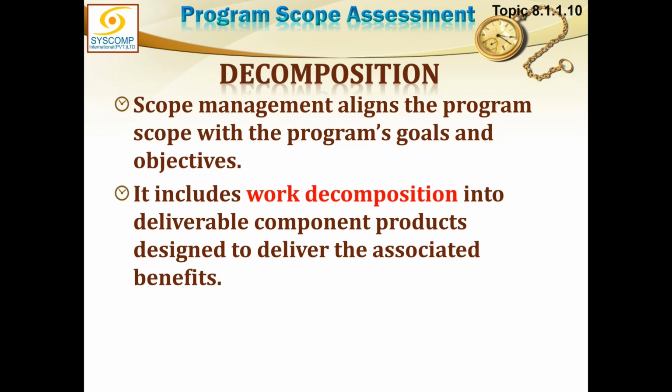Further decomposition of those products is the job of the project manager. The respective project manager or component manager would be responsible for creating their project work breakdown structure, but here we are talking about the program level work breakdown structure.